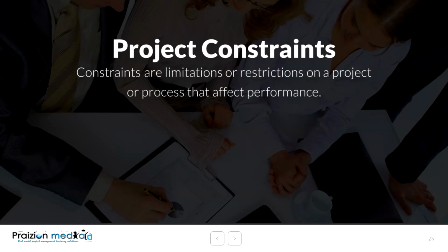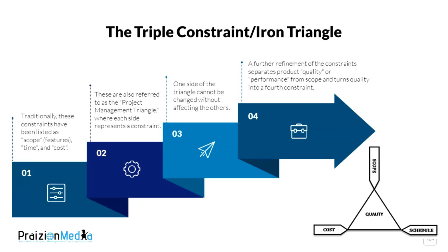For example, if you see you're trending towards massive cost expenditures, in the monitoring and controlling process group, this is where you would steer the project back. You would carry out actions to bring back your cost into alignment. Also, when we talk about schedule management, in controlling the schedule, we also need to bring back the schedule into alignment. If we see we're going off and we could be late, then we need to bring it back in alignment. Same for scope. We find out that we're doing things we didn't plan to do, we need to steer the project back and stop gold plating and stop the scope creep.